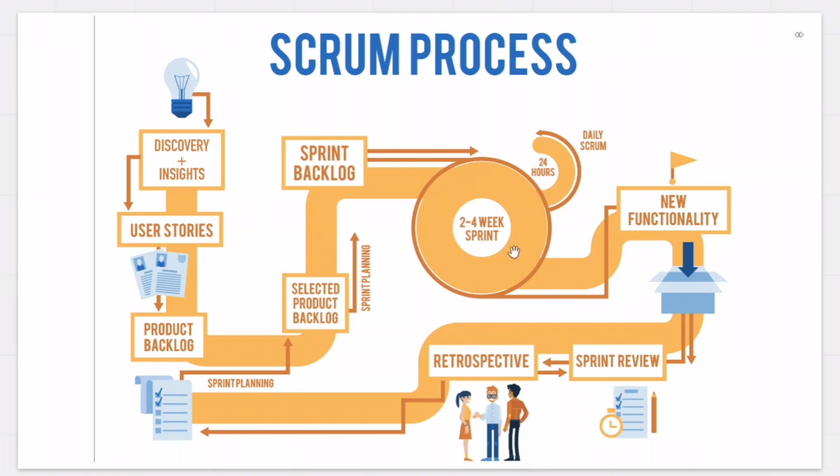And then you have what's called a daily scrum. So the normal methodology is that you do a stand-up every day with the team, and you talk about what worked, what didn't work, any blockers. You also have a sprint planning session at the beginning of every sprint, where you are planning that backlog and what the goals are, and the team will be saying, I think this is going to take me X amount of time so I can do X, Y, and Z. Okay, John, here's your task.